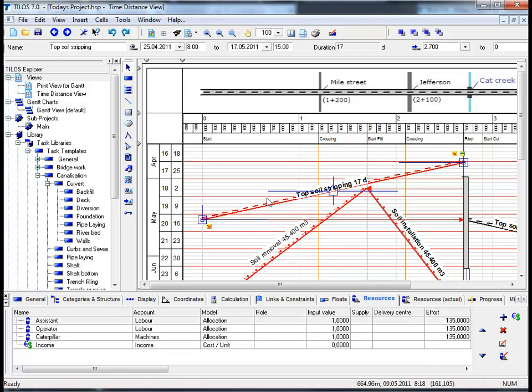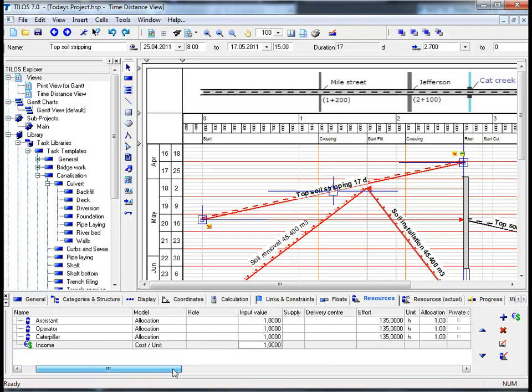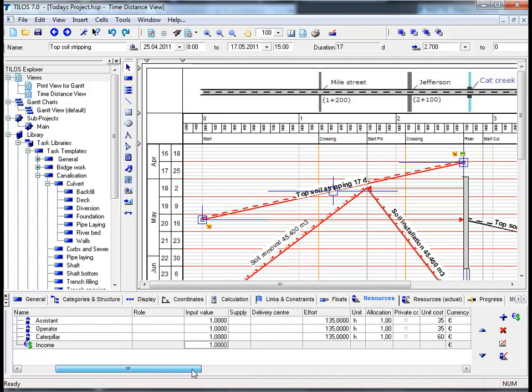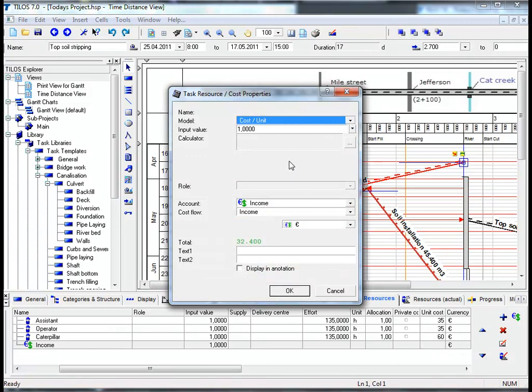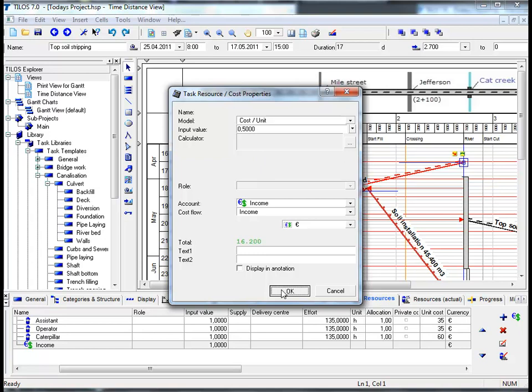It is worth mentioning that direct costs can be assigned as a fixed value, for example 10,000 euros for the entire task, or based on time, 500 euros per day, or based on the task quantity. In this example we are going to change the input value to 1 and take the scroll bar and drag it along slightly until we reach the unit cost column.